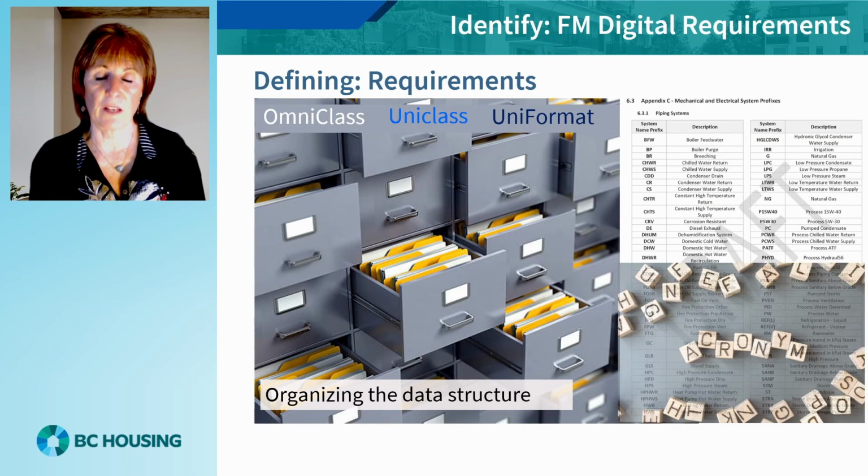All design teams have different naming conventions, so it is vital that a common classification system is chosen. It is important that as a facilities team, you define the classification system you wish to use. This underlying classification system acts as a common data structure for organizing the data set and supports data mapping. The typical choice is whatever is currently being used by the FM team and with which they are familiar.